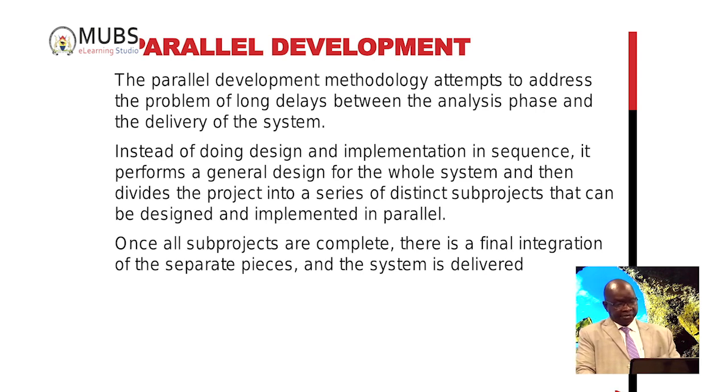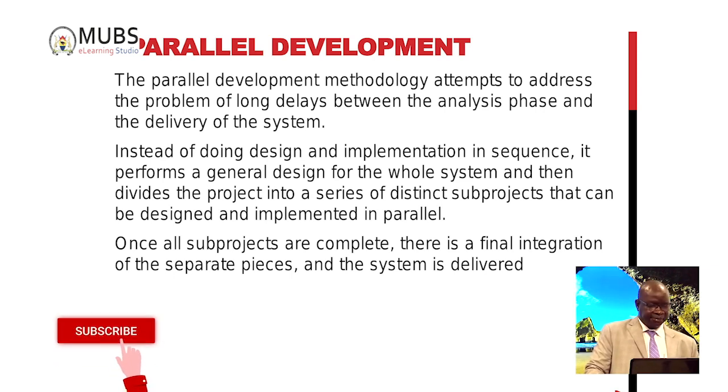The parallel development methodology attempts to address the problem of long delays between the analysis phase and delivery of the system. So instead of doing design and implementation in a sequence following one after the other, it performs a general design for the whole system, and then divides the project into a series of distinct projects that can be designed and implemented in parallel.